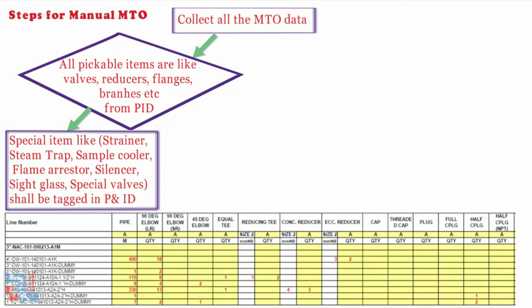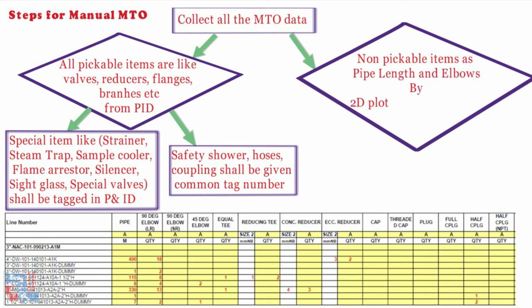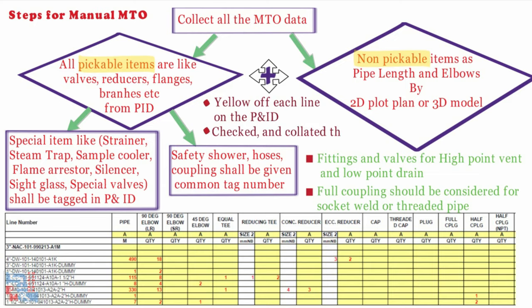For special items like strainers, steam traps, sample coolers, flame arrestors, silencers, sight glasses, and special valves, these shall be tagged in the P&ID. Items like safety showers, hoses, and couplings shall be given a common tag number distinctly. Non-pickable items such as pipe length and elbows are generated by routing each line shown on the P&ID and identifying a routing on the 2D plot plan or by routing the line directly in a 3D platform. Fittings and valves for high-point vents and low-point drains should be considered, and full couplings should be considered for socket weld or threaded pipe in long runs at 6 to 7 meter intervals. Then combine pickable bulk items and non-pickable items except piping special items. Yellow off each line on the P&ID as you go; once all lines are yellowed off, they can be checked and the data collated into the preliminary MTO.